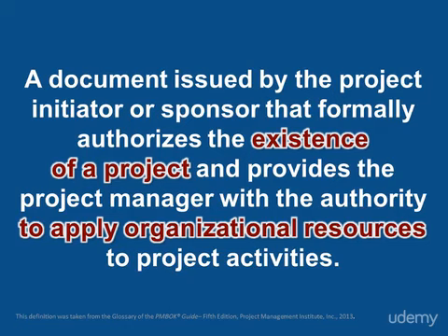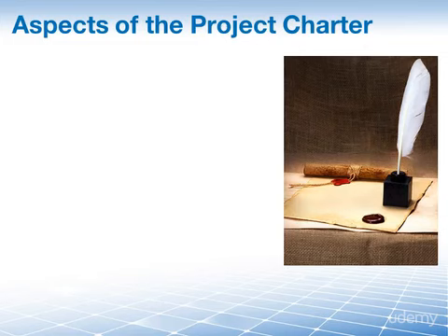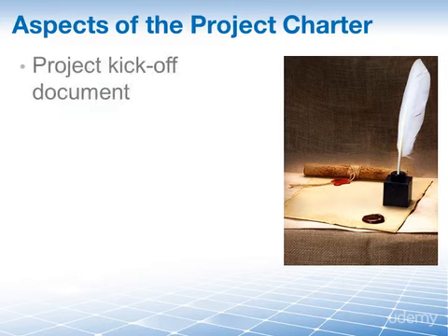It also serves a very important role for us. It authorizes the project manager to apply organizational resources to the project. As we have seen, the business case and the project statement of work are both created a long time before the project starts. The project charter, on the other hand, really serves as your project's kickoff document. We use the two other documents we have discussed so far as inputs to create the project charter.